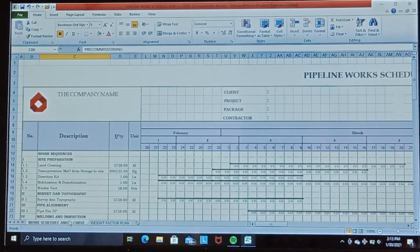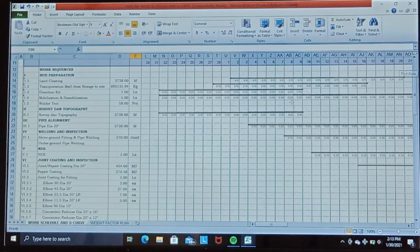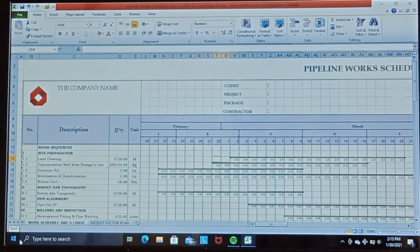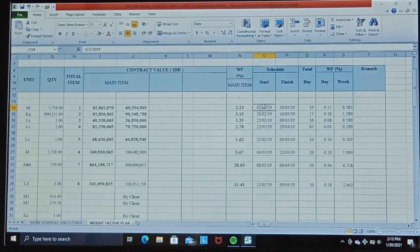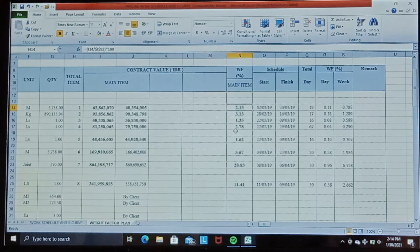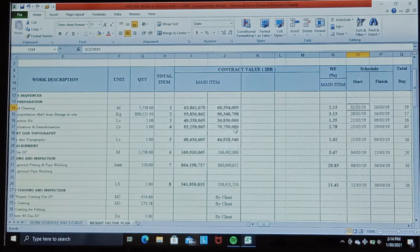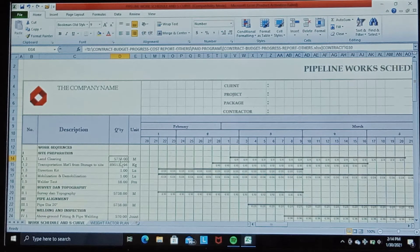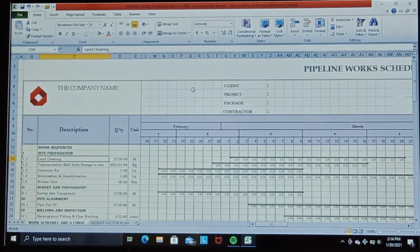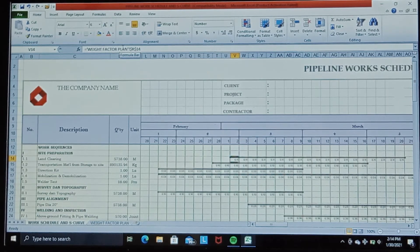Now we go back to the work schedule and S-curve worksheet. We create the schedule line, and draw it according to the schedule defined in the first worksheet. For example, the direct work item for land clearing starts from 2 March 2019 until 20 March 2019. We then insert the combination weight factor into each cell along the schedule line. I have already formulated these cells by reference to the other worksheet.